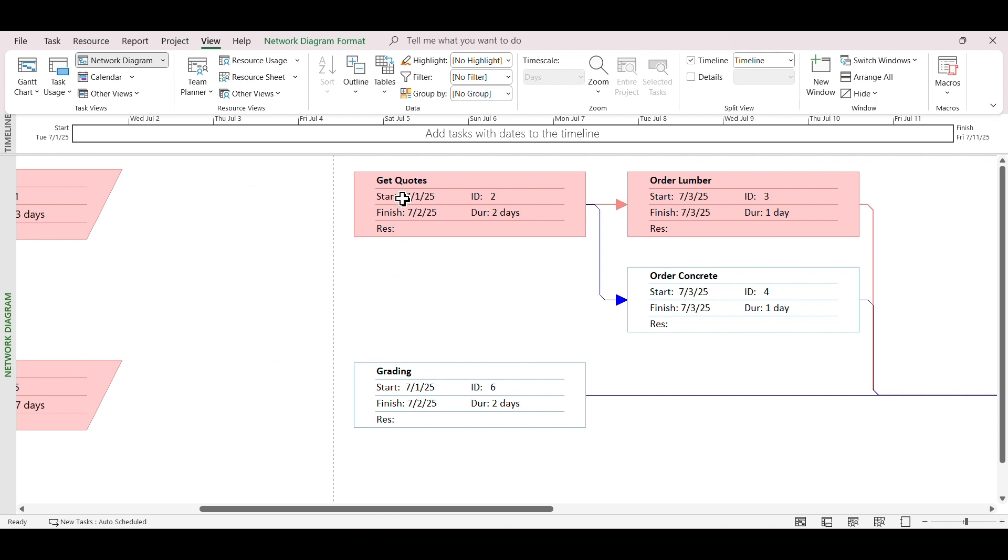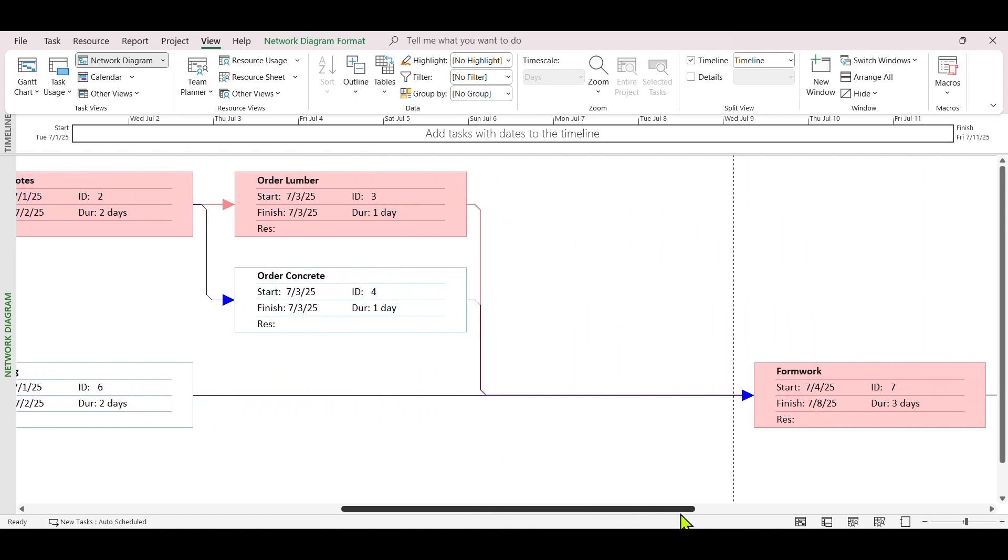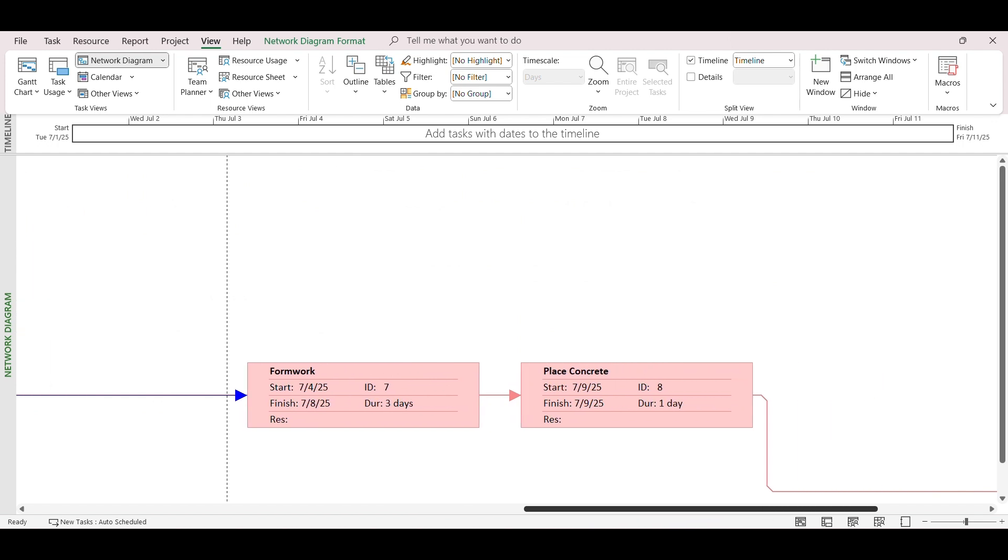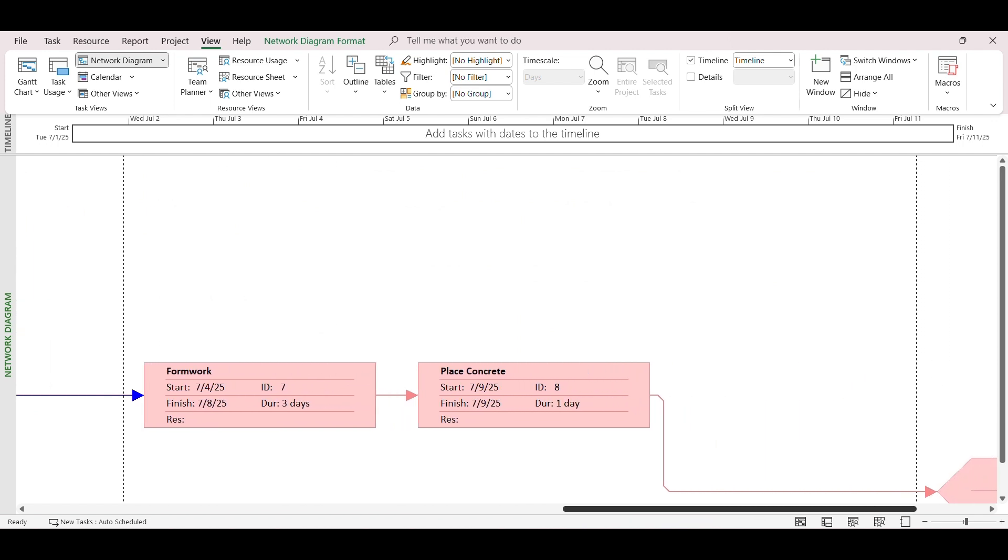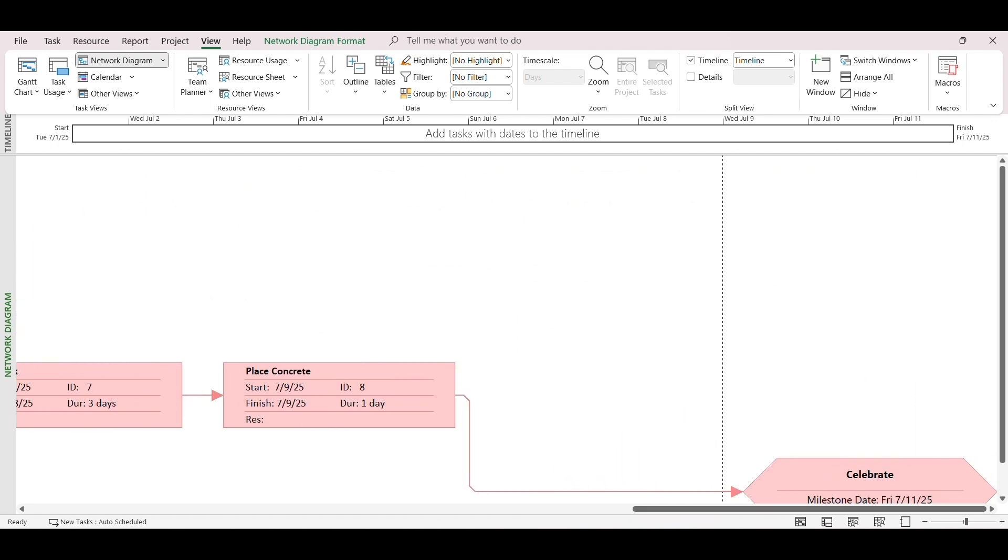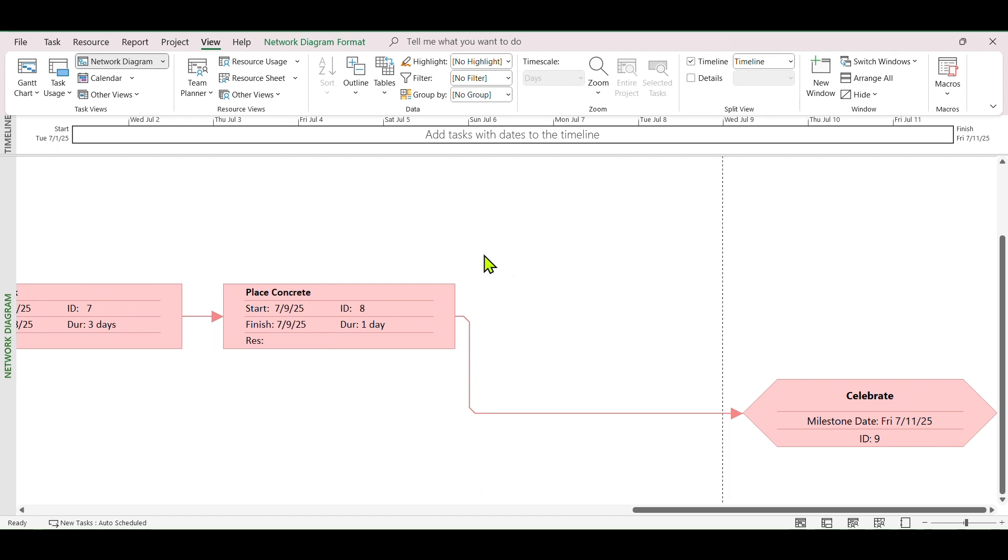Here, tasks are shown as boxes with start date, finish date, ID, and duration information. The lines and arrows mean task relationships. Red color means tasks are critical, or tasks that cannot be delayed. To go back to your previous view, click Gantt Chart button from the toolbar above.